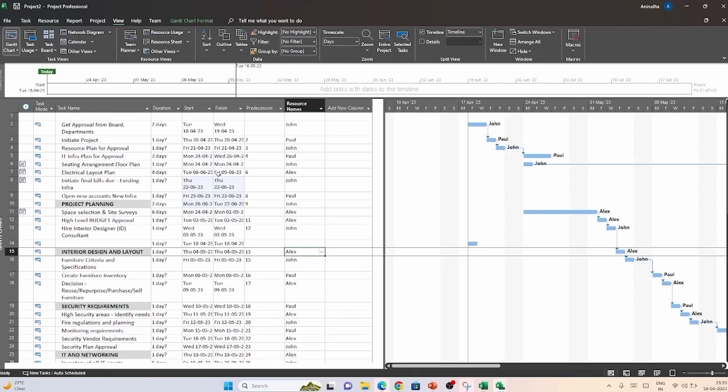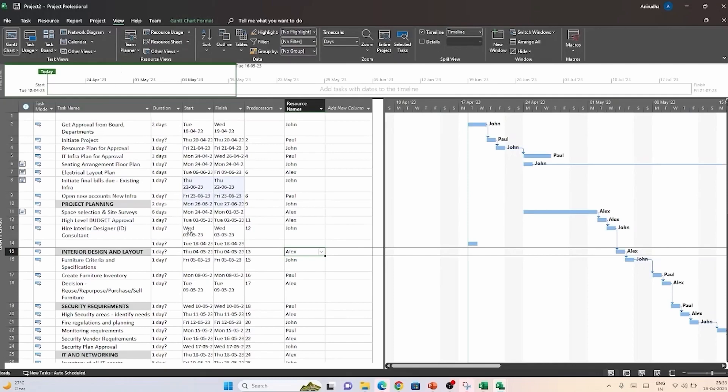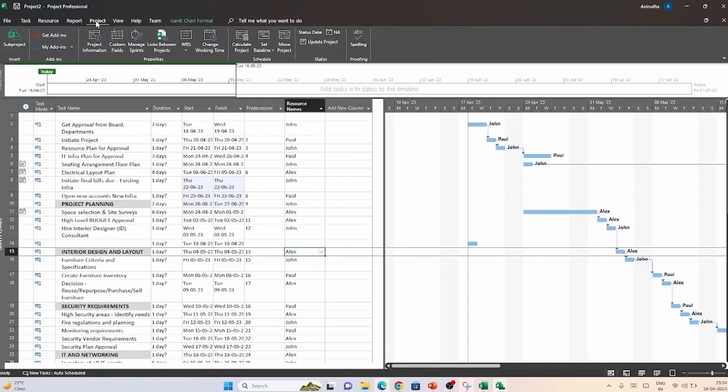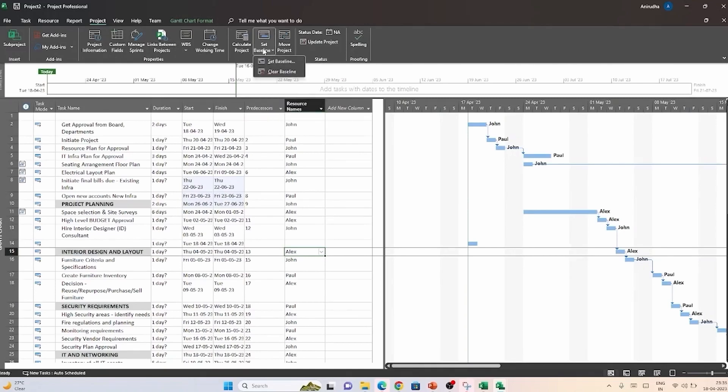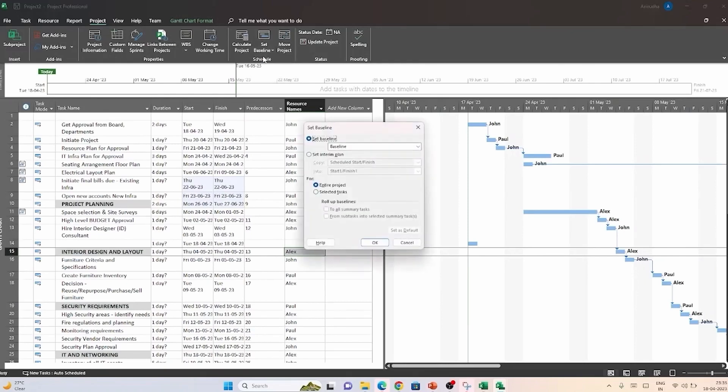First, what do you see in the variance table in the click of the view tab? This is your view tab. Now, when you look into the view tab, you can see that there is already a Gantt chart here. We are in the project tab. Now, in the schedule section, you will see a button as set baseline. This opens up a drop down that you can see here and we will choose the first option that is to set baseline. A dialog box will open up and there we can set our parameters.